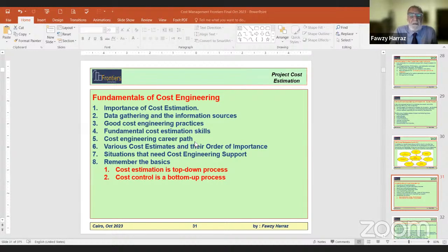So this exercise is very simple. You simply go to the bill of quantities of the project, the unit rates, say per 100 square meter, unit rate is this, rebar, and then before that you need to consider leveling and compacting the area under the slab. So you have maybe 3 or 4 line items. Or if the client wants to paint this with epoxy paint for special service requirements, you add 1 line for painting with epoxy. So the quantities are clearly known and the unit rates are there.